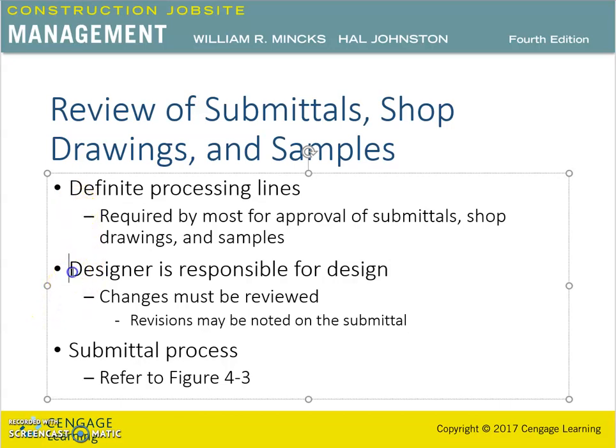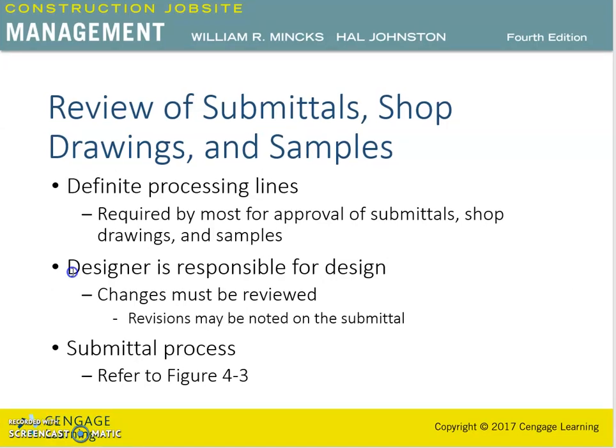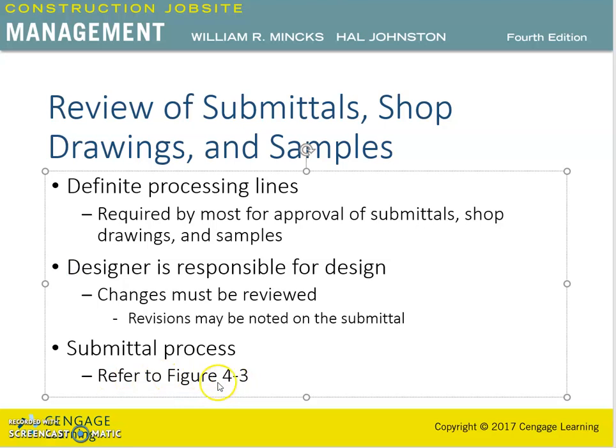So the designer is ultimately responsible for the design of the facility to meet occupancy needs and must ensure that the products being installed are suitable to meet the need. Any changes in material or fabrication needs to be reviewed for its acceptability with the original design. The submittal process for shop drawings or samples is highlighted in figure 4-3.